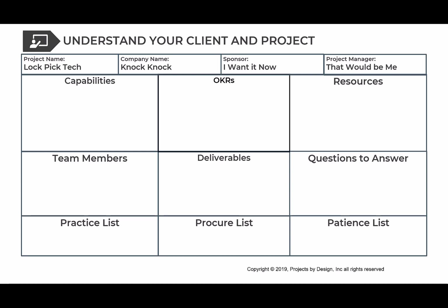And a lot of the times, we get commitments, right? Well, you can have this attorney for 20% of the week to work on the project. Well, in reality, that 20% is actually 5, because they got dockets, they got trials, they got stuff that comes up. So we're always sort of behind the ball. Laz has a completely different set of problems where he's got people he's trying to split in half to support operations, but also support projects.